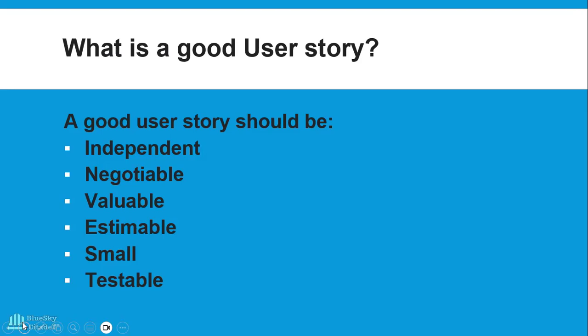Now, the way you must write your user story, it will be in such a way that it can be estimated. So, again, when you are having your refinements, the developers and testers will have to estimate the effort, right, that will be put in to develop or create that piece of work. Now, if you cannot estimate it properly, you have to break it into smaller pieces because it has to be small enough to understand. See, this point ties in with the next one, the small. So let me just talk about the two.